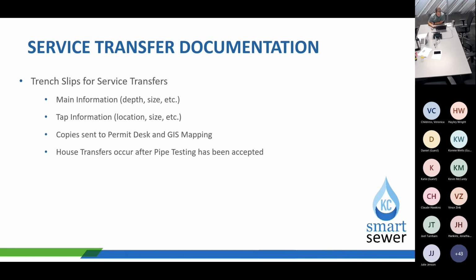But the main point of service transfers is to get that documentation that the old main, it's not connected and tied into that old main. It's connected now to the new. So on noting that, it will also be in a remark. Will be, contractor connected. Actually, I guess we go to the next slide.